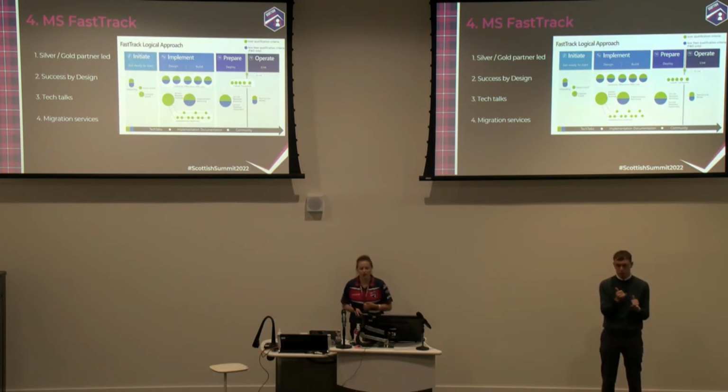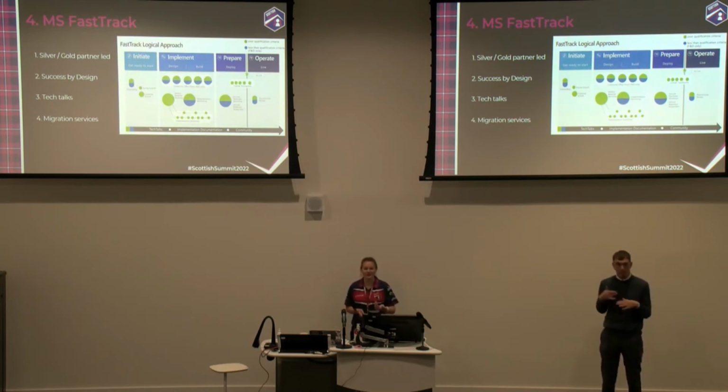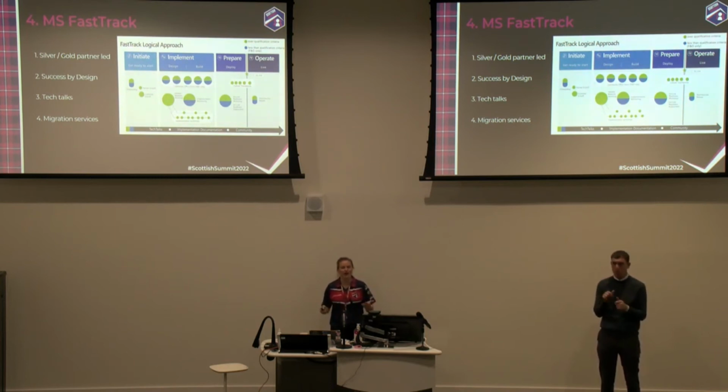The last part of it is the Go Live Readiness Workshop. Once again, you get the questionnaire, you answer different levels of questions, you fill them in, and based on the answers, they figure out whether you are ready to go live. Have you thought of everything? Are you missing something? And all of the information that you put in all of those workshops is also good documentation that you have afterwards.